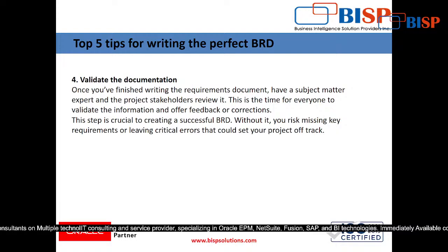If you miss any one requirement, it will create problems for your project, because suppose the deadline is after 6 months, it will go up to after 1 year also. Why? Because once you have done your scripting part and prepared your interfaces, and the client says this thing is missing, you and your developer both have to work double. So that's why take time in preparing a BRD first. Don't be in a hurry, just take your time to prepare an effective BRD, and then you go further.